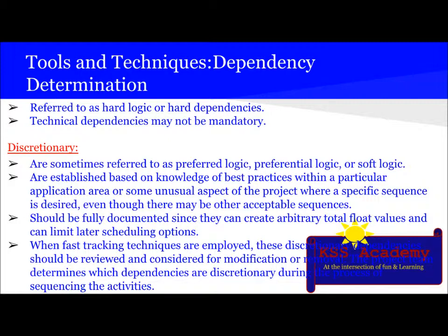What's discretionary? Discretionary dependencies are sometimes referred to as preferred logic, preferential logic or soft logic. They are established based on knowledge of best practices within the particular application area or some unusual aspect of the project where a specific sequence is desired, even though there may be other acceptable sequences.